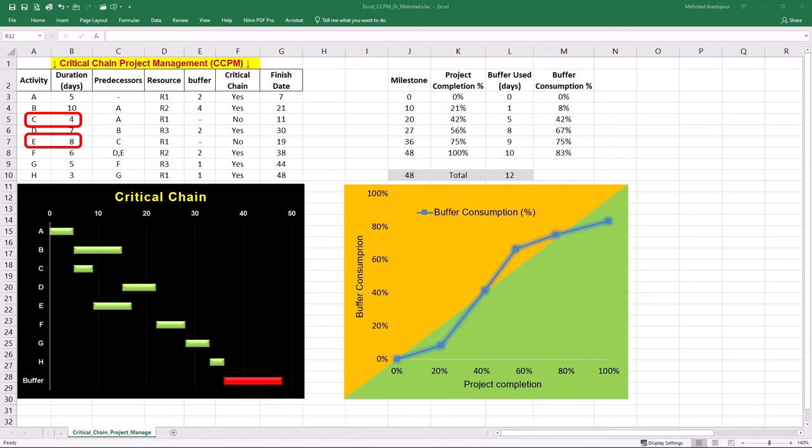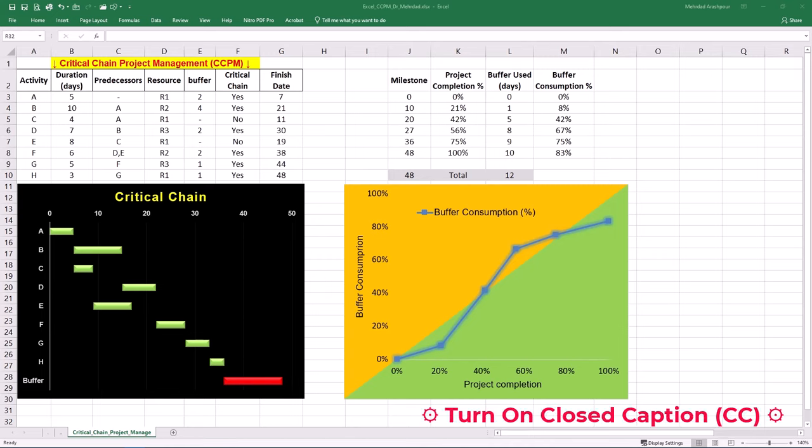The total duration of these activities is 12 days. In CCPM, a feeding buffer is typically set at around 50% of the non-critical path duration. This safeguards for any delays in non-critical activities and consequent impact on the critical chain.